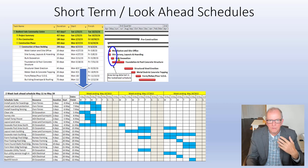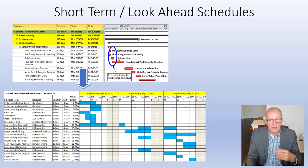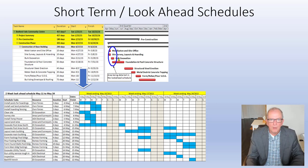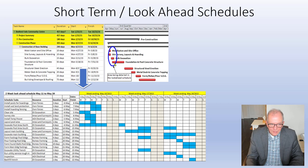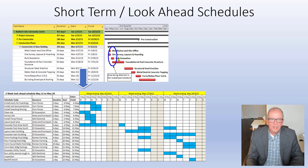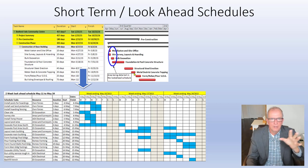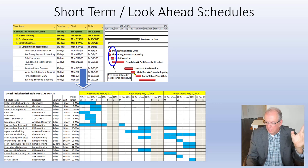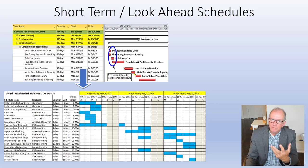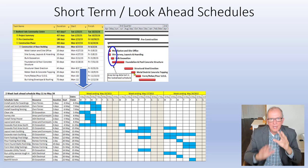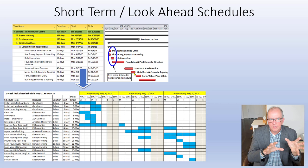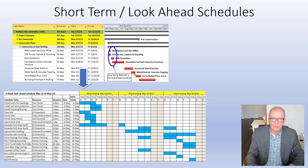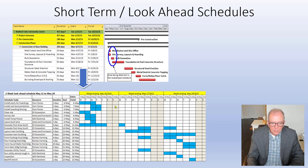We develop a baseline, and as we start doing the work, things change, things don't go the way we expected, so this needs to be adjusted on an ongoing basis. Usually formally, depends what country you're in, but in Canada typically there's a formal update to the client once a month and then iterative updates maybe weekly or bi-weekly on the master schedule. This master schedule because it has a critical path will show you the impacts, how they ripple through your project, how that will change your finish date if nothing else is done.